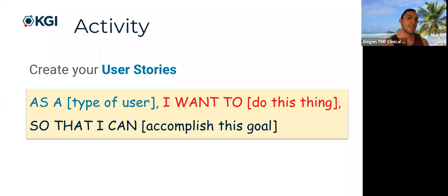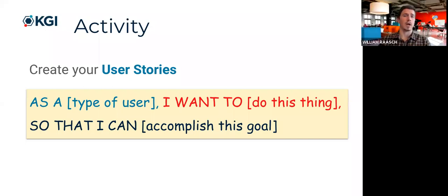Yeah, very cool. And I would say, I think that it's definitely ambitious to try to roll that out within a hospital tomorrow, right? But what you can do is break it down into much smaller sections to see maybe how would that automation work within a very small subset of what a doctor does, right? So maybe you just stick with blood work as an example, and there's a lot of data entry with the results that come back from the test there.